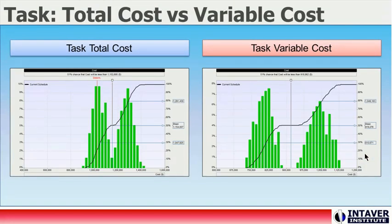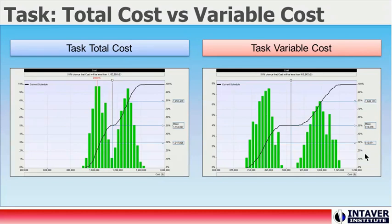In the previous views, we have been looking at project-level analysis. However, it is possible to drill down to the activity level to view the cost analysis. On the left, the chart shows us probabilistic total task costs. Of note, the histogram is bimodal, which shows two distinct distributions — the one on the left is due to uncertainty or natural variance, and the second, to the right, is due to a serious risk event occurring. The chart on the right shows task variable costs for resource costs only. The second distribution is even more distinct, so we know that the risk is tightly correlated with the resources allocated to this activity.